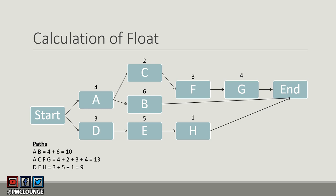We already know what float is and have seen this network diagram in our critical path video. We found three paths: AB, ACFG, and DEH. We added their durations and calculated the total for all three paths.